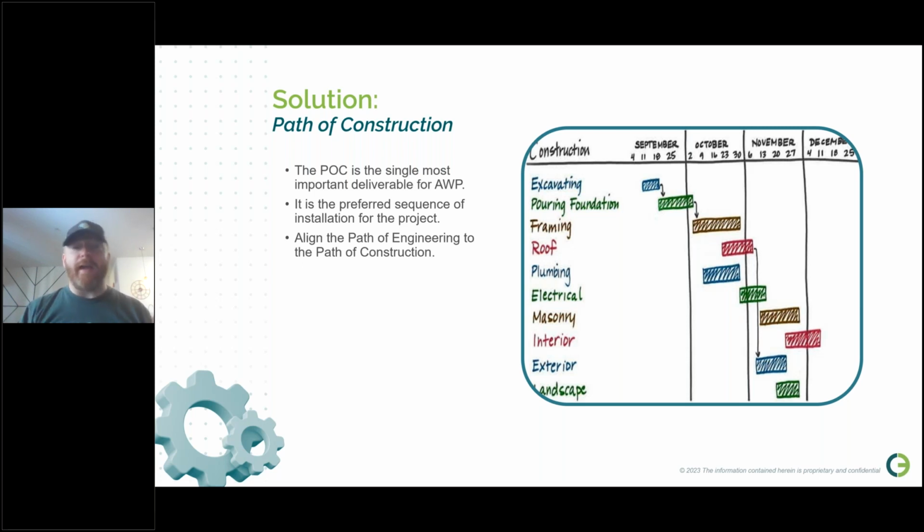And engineering and procurement should be involved in it. Let the construction people drive it, let them lead it. But engineering needs to be involved. They need to be able to point out logical constraints and issues. Let the procurement people throw up, well, hang on a sec, that thing's going to take 18 months to fabricate. You should even bring in your commissioning folks to start talking about what's the turnover sequence. None of these entities should exist in isolation.